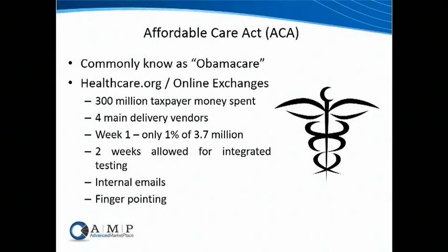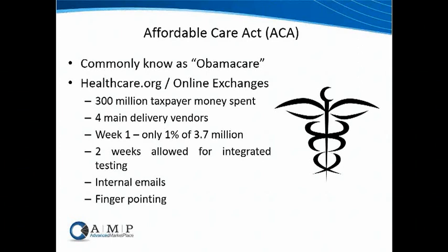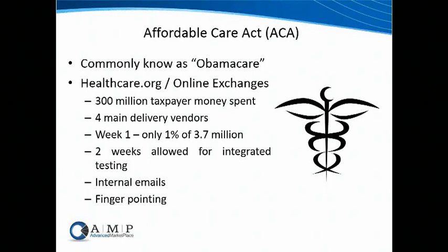They only allowed 2 weeks for integrated testing. There were a lot of shared internal emails around particular points like the lack of security testing and potential security vulnerabilities, and a whole bunch of finger pointing going on internally. So that's what we really know from a high level without digging in and investigating the individual aspects. Now, a lot of people have taken a different spin on this.